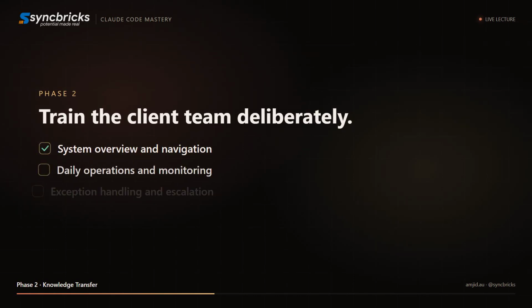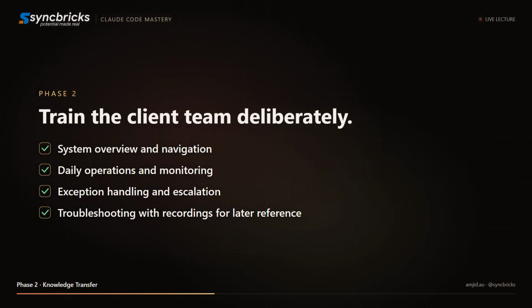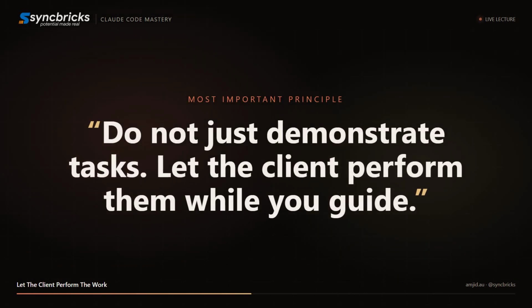The second phase is knowledge transfer. This involves training the client or chooser's team. You should conduct structured sessions covering system overview, daily operations, exception handling, and troubleshooting. The most important principle here is active participation.